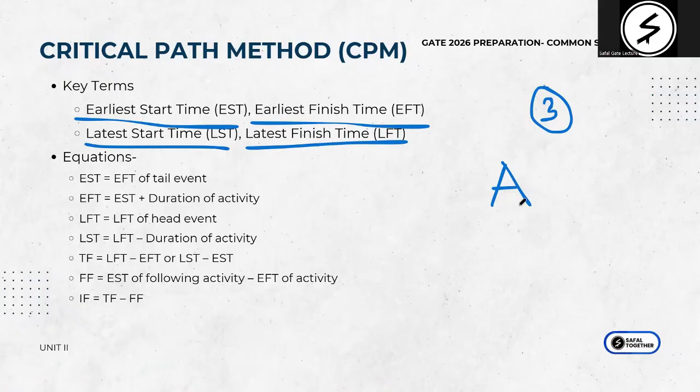It needs 3 days. This is our understanding so far. We have been looking at projects and networks with this understanding. So your earliest start time is always 0. Why? Because you're starting, you don't have anything, it is not dependent on anything. That is your EST for the first activity. So we're looking at one activity individually, and I want you to understand that EST, which is your earliest start time, is this.